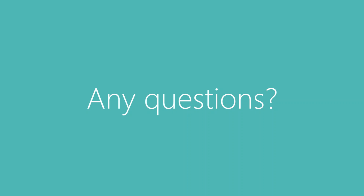What are the typical reasons there is no project charter? Please feel free to put in your experience too, I'd like to hear that, but the ones I've noticed are that a sponsor or stakeholders sometimes don't have the time. Usually it's, I don't have time to write a charter, but they want the project, right? That's a common one. And it could also be that they don't have that much maturity working with projects. And there are certain groups, like the legal department, where it's, we don't do charters. That's their mentality. So work with them.